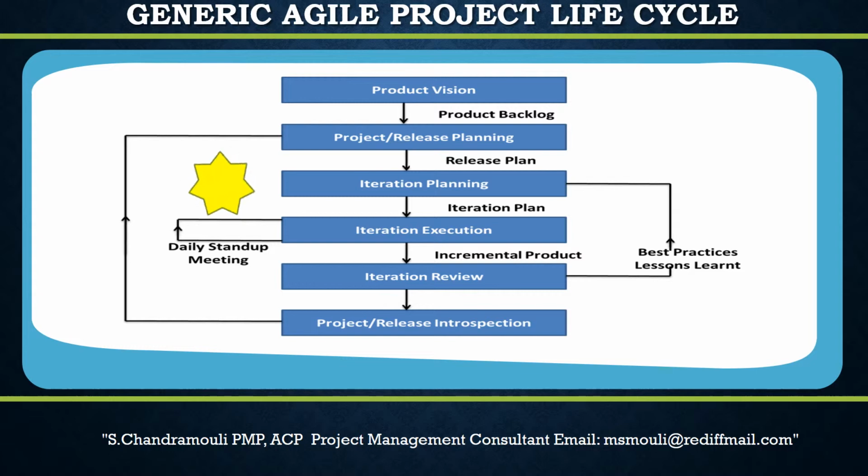After you've finished brainstorming tasks, list those out in a sequential manner, and spread them out on the table, and look at the whole picture. The team should discuss now, are these tasks enough to finish all of the stories, and are there any duplicates or overlaps? Discuss and fix any problems. Finish the brainstorming before starting the estimation.